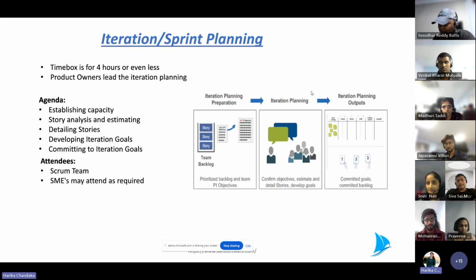Okay. Within UC, we have story point estimation as one story point equals half a day. During sprint planning, we always ensure that the story is clear and the objective is clear, and ask the developer his effort, in how many days will he be able to get that done. If it takes half a day, he'll give one story point.